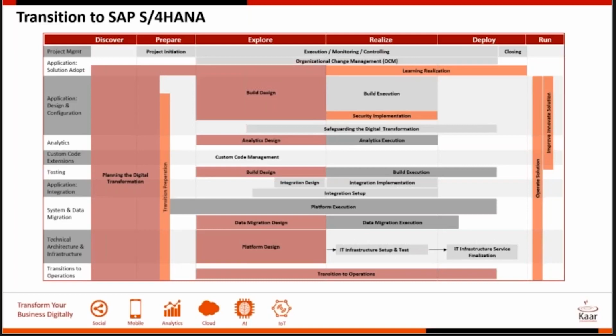Why the work stream is important is because this primarily tells you the kind of resources who are going to play a part in this whole process. If we can effectively put the entire list of conversion tasks into the right cell in the matrix, then the conversion is already well begun. So this is the first step for us to understand what are all the tasks that have to be executed, and also when it should be executed and by whom.